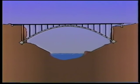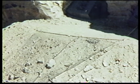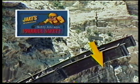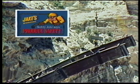The way that it actually looked during construction is shown here. Olson Beale started erecting the west ribs as planned. First, they laid a safety net across the canyon floor under the construction area. As each pair of ribs was set, the safety net was pulled up and connected to them. Outrigger beams extended the fall range of the net 10 feet outside the arches.